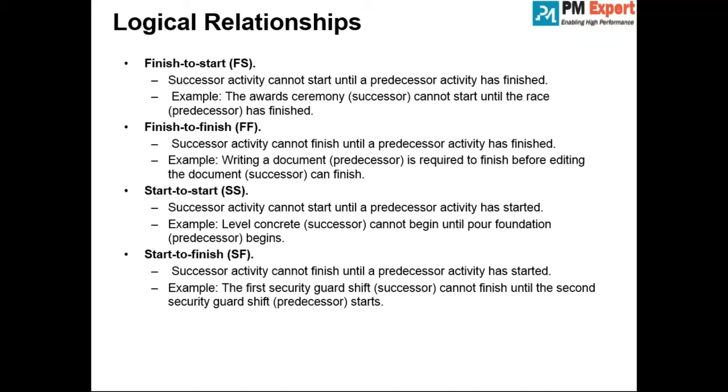Yes. Right? Now, before I move to finish to finish and start to start, which are simple, I will straight away jump to start to finish. Now, can you give me any example where successor drives the predecessor? See, in a start to finish relationship, the successor drives the predecessor. In the real-time situation, wherever just-in-time inventory system will prevail, it will be successor driving the predecessor.